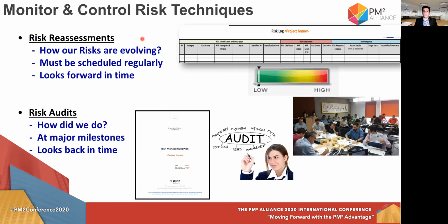Of course, these risk reassessments have to be scheduled regularly, and we are dealing with risks and updating the position of the risks inside the risk log according to the risk likelihood, the risk impact, and of course the risk level here. On the other hand, the risk audits deal with how effective and efficient the risk activities and the risk procedures we are using are.